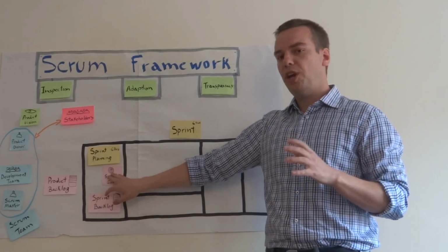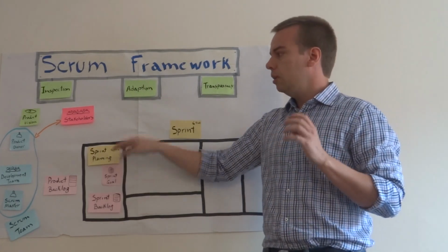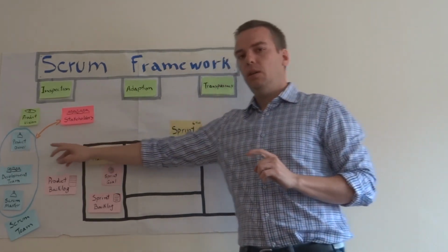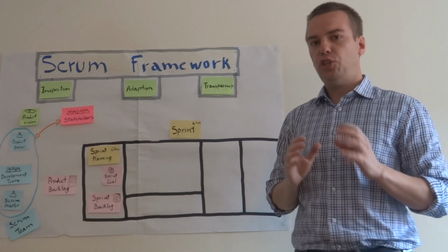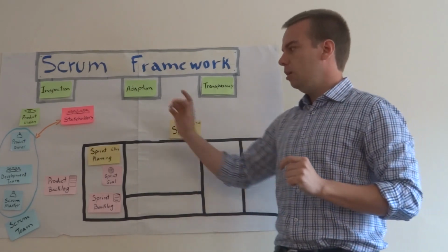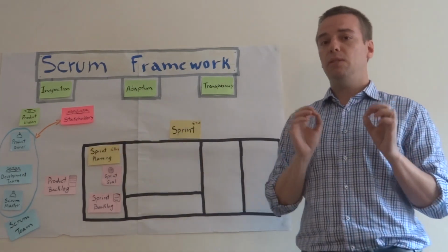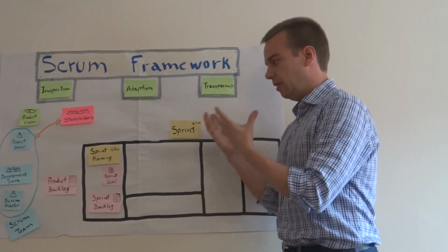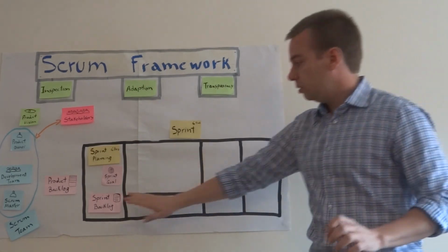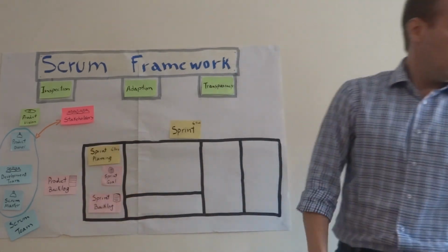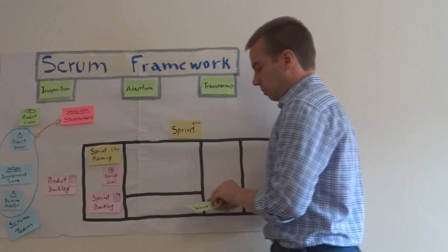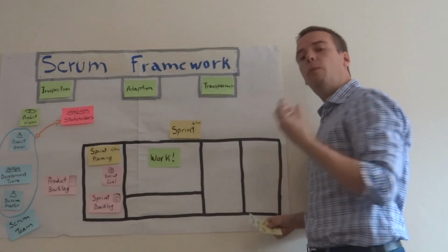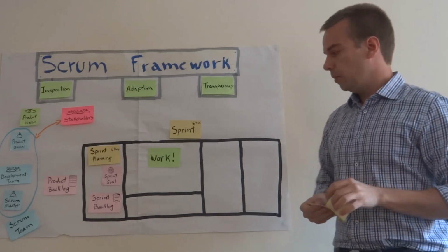If the sprint goal has to change or is not valid anymore, the only person that can cancel the sprint then is the product owner. And no one else can change the sprint goal or cancel the sprint, just the product owner. But be careful, because this can be very impacting for everyone involved in this development. So I already mentioned that this is owned by the dev team. So then the team starts working on this plan towards the goal to produce potentially releasable software.